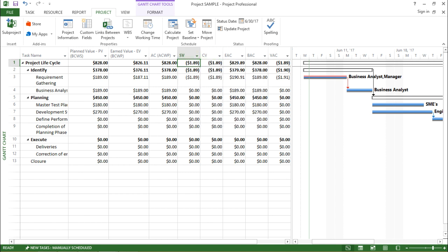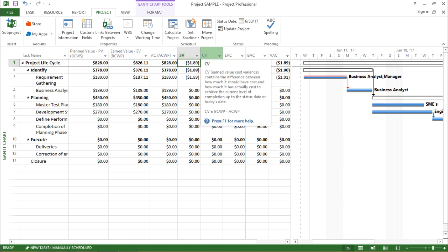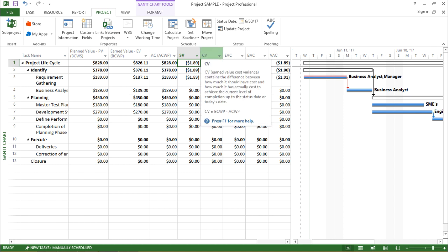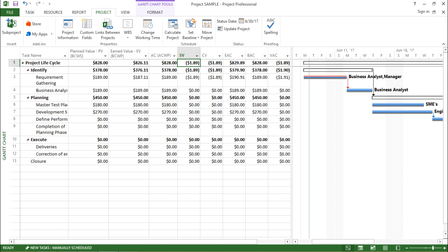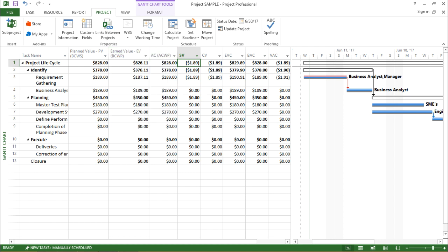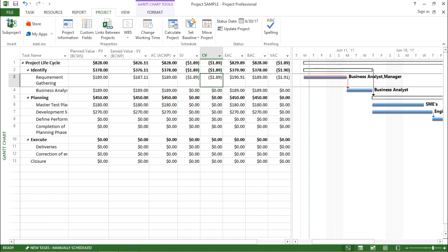Moving on, the next column says Cost Variance. The tooltip reads: 'It contains the difference between how much it should have cost and how much it has actually cost for this particular project.' So CV, that is Cost Variance, is the difference between the Earned Value and the Actual Cost, and this is what I see on the screen right now.